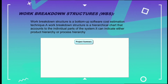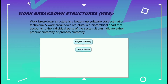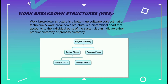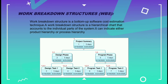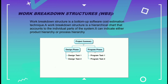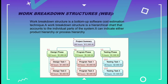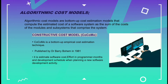Work Breakdown Structure (WBS) is a bottom-up cost estimation technique. It is a hierarchical chart that accounts for the individual parts of the system, and can be either a product hierarchy or a process hierarchy. Product hierarchy identifies product components and how they are interconnected, while process hierarchy identifies work activities and the relationships among them.